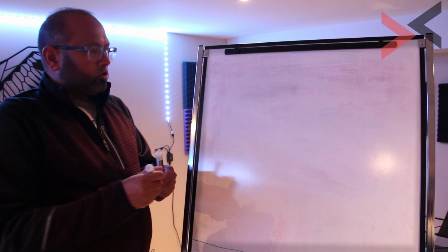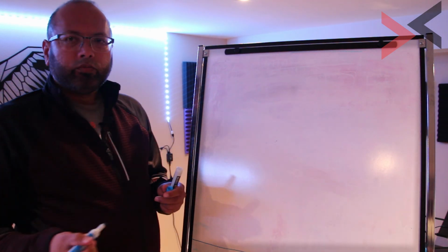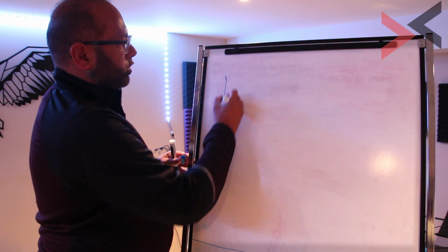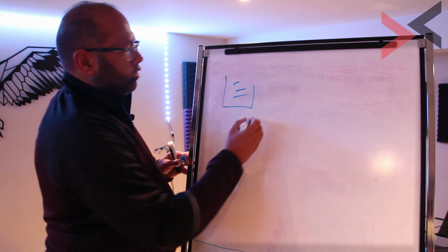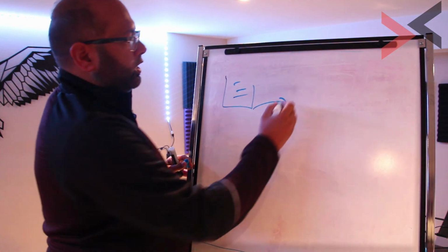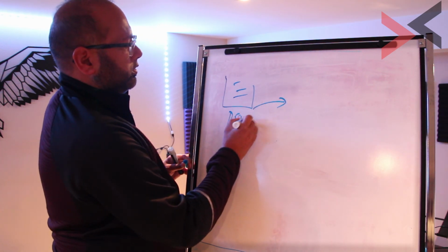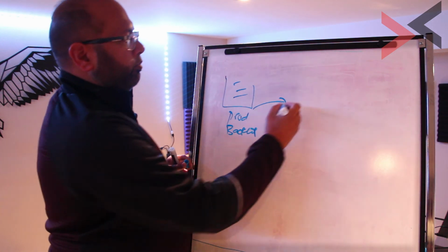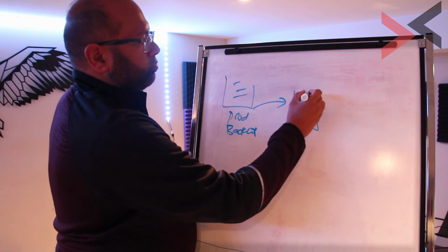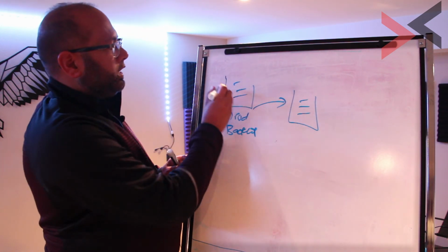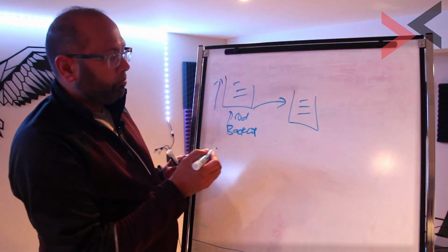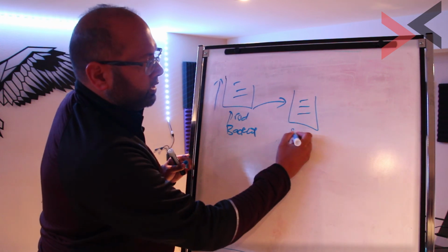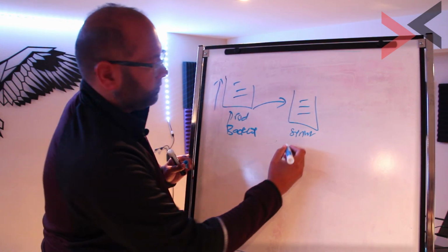So next what you're going to talk about is how do you do some of the ceremonies within Scrum. So you have your backlog. You're going to take that backlog, and this is your product backlog. You're going to break this down into smaller chunks, i.e. the backlog is prioritized by the product owner. So you're going to take the top 3, top 5 into this sprint backlog.